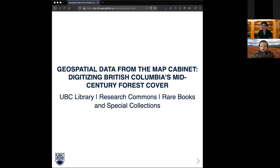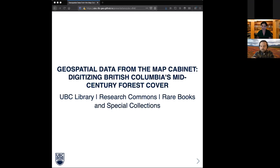Thank you, Eka. So I'm Claire Williams. I work as a forestry archivist at Rare Books and Special Collections. We're at the UBC Vancouver campus, located on the unceded ancestral and traditional territories of the Musqueam people. We're going to share today about a project that Evan and I collaborated on — digitizing British Columbia's historic forest cover. In the span of seven months, we together with a larger team came up with a project plan, secured funding, and scanned and georeferenced 149 maps showing the forest cover of the entire province of British Columbia.